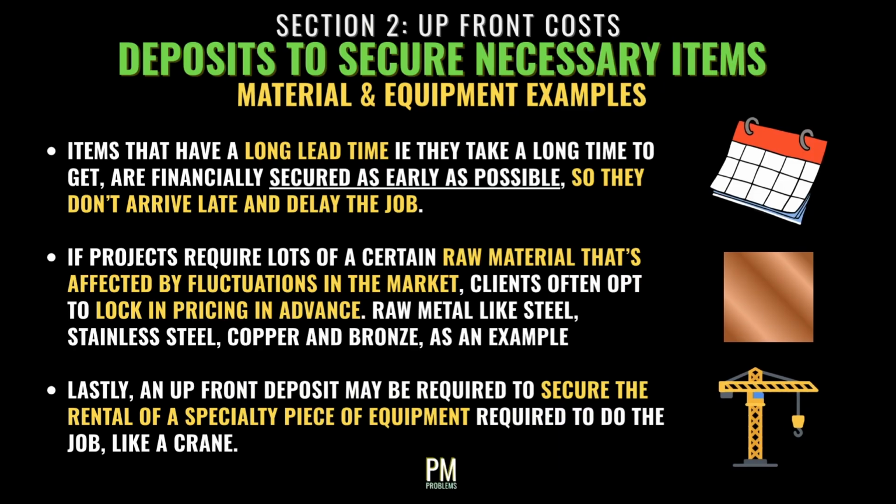Another type of cost that's often billed for before work ever begins are deposits on materials and equipment. This can include items that have a long lead time, i.e., they take a long time to get, and therefore are financially secured as early as possible in the timeline, so they don't arrive late and delay the job.